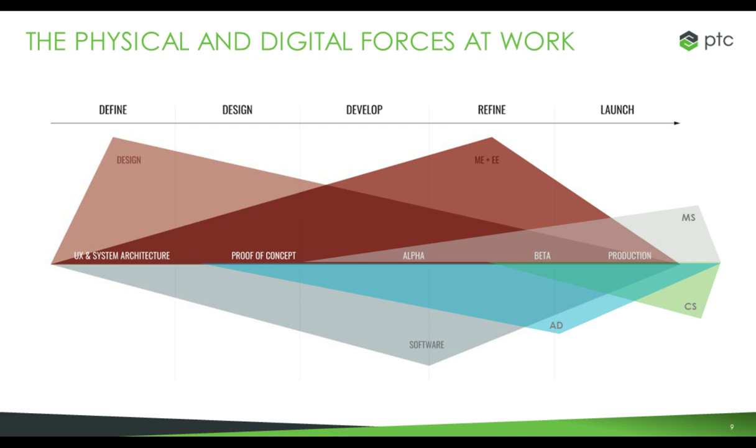And then we can always shift things over if we're seeing overruns in mechanical. Is there a budget, are there features and functions that we can drive out? Do we go back and make changes associated with design to ensure budget? Is it something we can toss to a roadmap? On the digital side, we tend to throw a lot of things out to a roadmap because with DevOps, you can add those very quickly after you hit your milestones. And again, what we found with DevOps and PTC ThingWorx is that it's amazingly easy to integrate that methodology into that platform, as though it was almost designed to do it, especially if you're another PTC user of things like Creo, where you can pull that information in and drive changes from a digital perspective, but also see how the data coming off the physical product can impact and go back and change designs for next-gen products.